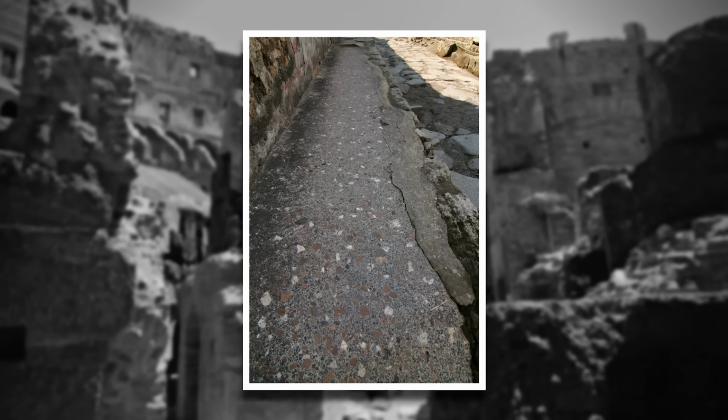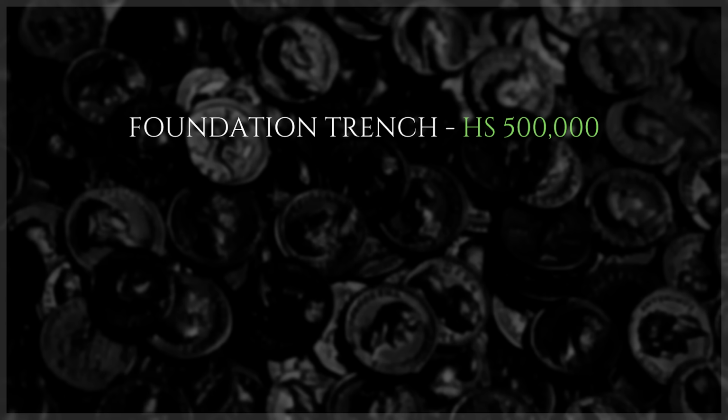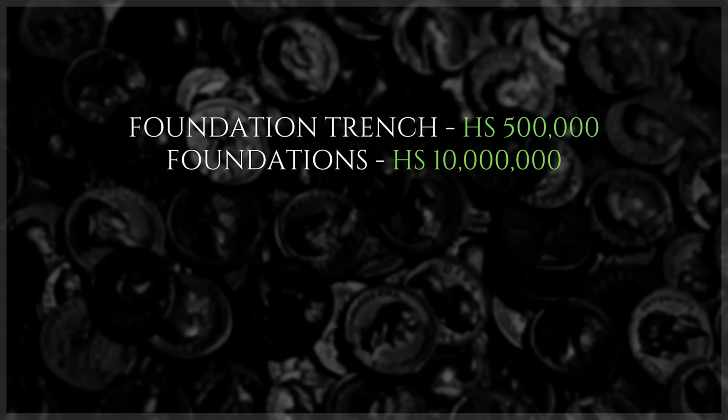Again following Janet Delane, who wrote an article on the relative costs of different kinds of Roman construction, I estimate that each cubic meter of concrete cost the equivalent of 10 days' wages for a laborer. By our equation, that gives a total of about 10 million sestertii for the foundation. Next, work began on the superstructure.